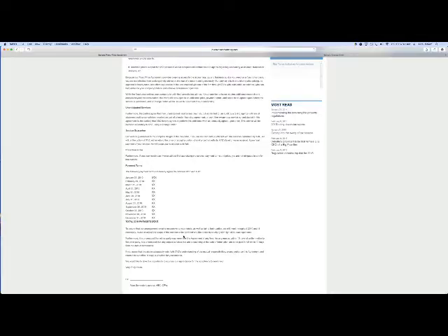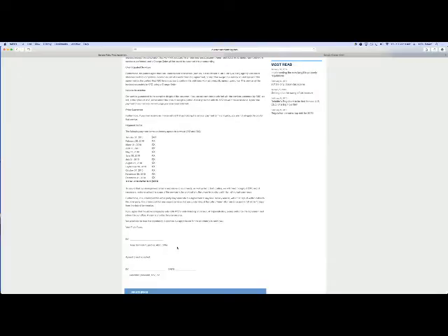If it's a new customer, if it's a startup that's growing very, very rapidly, you might want to put that clause in there. And then basically the last one is a termination clause. Either party can terminate this with written notice within 10 days. Now, obviously there's more burden on us. We can't terminate a customer on, say, April 14th. You've got ethical responsibilities and other types of things. But by and large, this is an at-will agreement, and either party can get out from under it. And as long as you follow the ethical prescriptions of the profession, that's okay. And that's basically it. They sign it, you sign it, and that's the fixed price agreement.